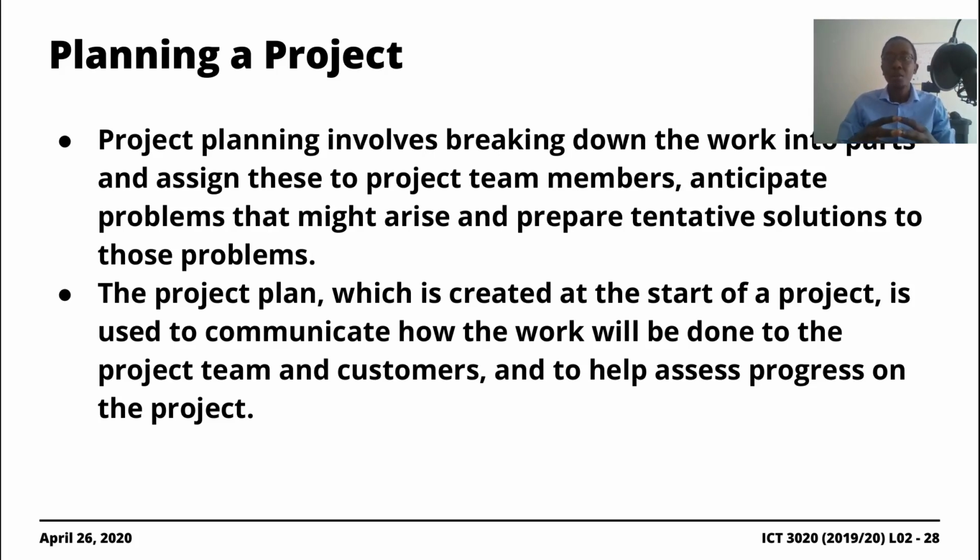So if you have a team composed of 4 members and you know that you're going to have to collect requirements and do the design, perhaps do a bit of testing and implementation, then what you'd have to do is come up with different roles associated with all those key activities. Then amongst the 4 project team members, you assign specific roles to those individuals.